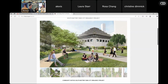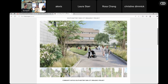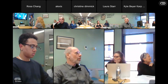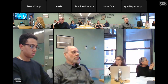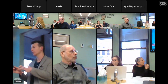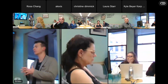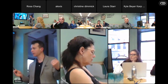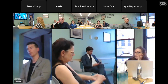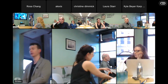And timing, I noticed there was a slide just talking about community improvements in the fall. What's the next moment? So construction in earnest is going to start at the end of the year. We're aiming for November, December. And then the goal is to start with the most vulnerable areas. So the connection to the South Project, right at the north of Stuyvesant, and the North Cove work will take the longest, so we're going to start there as well. Those will be the first under significant construction.